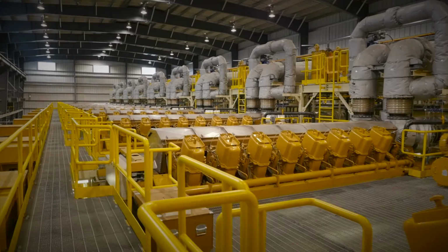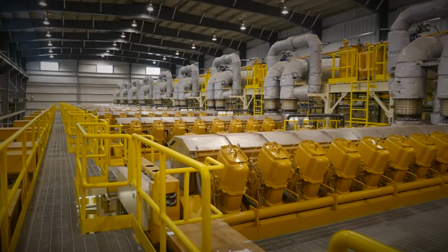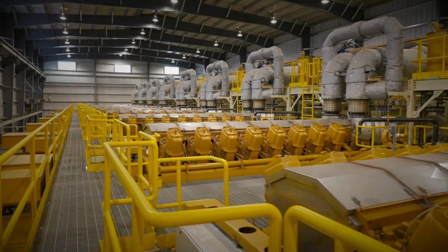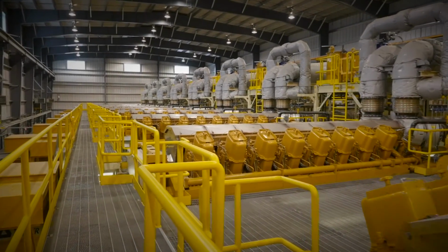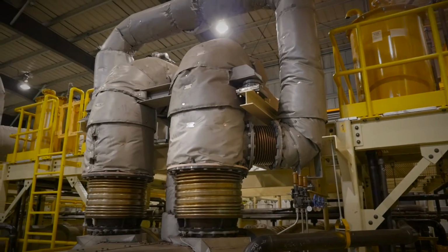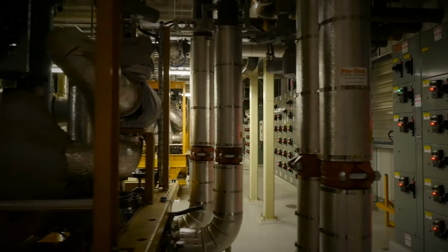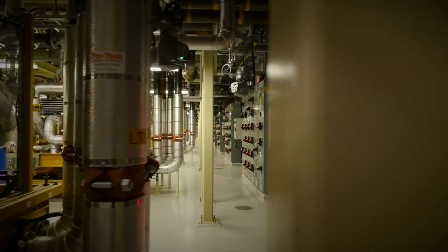The Caterpillar engines worked well with us for the scope of work, what we wanted. They used a lot of the mill specifications. We said, well, we don't want a plant out here that's different from the mill because of spare parts and our tradesmen. So that went well. And the people they had on site for construction, we call it the construction management, and the people they had on site from Caterpillar for all the commissioning, they were easy to work with.